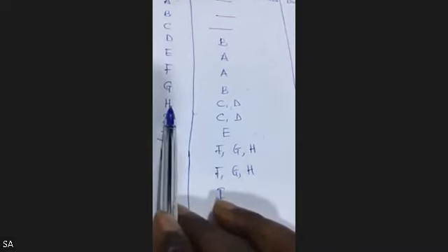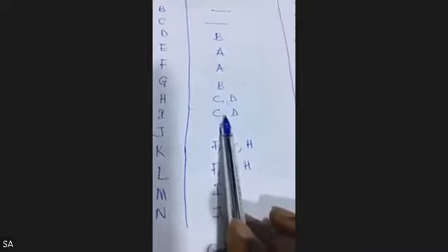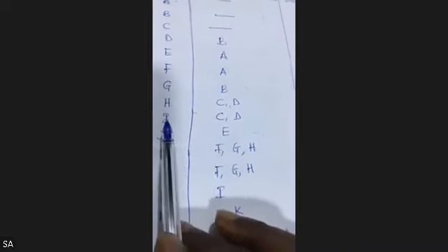Now, the third point: C and D, this one that joined together, how do we deal with it? Class, C and D means that they must follow each other immediately. It means that they must be completed first before you proceed to start H. C and D must be completed first before you proceed to start I. In other words, C and D have the same nodes, the same ending points.